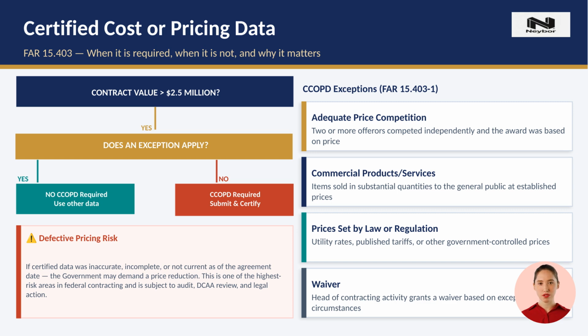The most important risk here is defective pricing. If the government later discovers that your certified data was wrong, even inadvertently, it can demand a price reduction for the amount the price was overstated. This is an area where rigorous internal cost tracking and certification processes are essential.